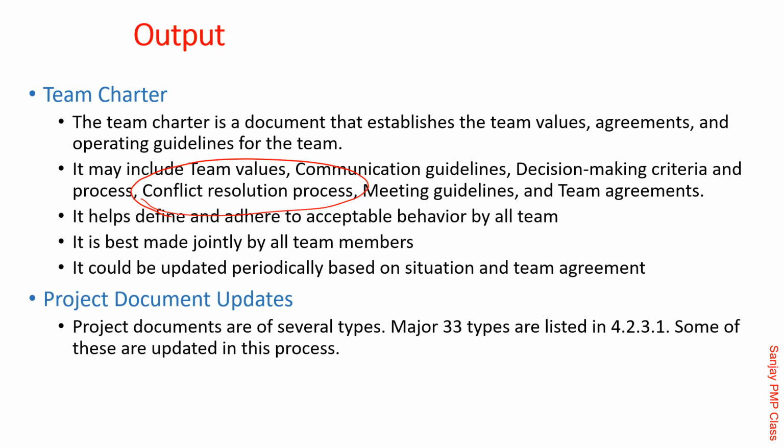One of the options, Aniruddha, will say requesting them to sit down together and come up with whatever is agreeable. That should always be the first option, which means the principle is that if there is a conflict between two individuals, preferably it should be resolved by them. They are very clear, not that everything could be. If everything was getting resolved, there would not have been a conflict. So when it is not resolved and it goes to the project manager, first check that such a thing has happened. If it has not, then start the resolution by the project manager.